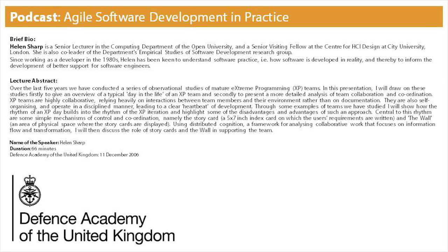Okay, so the developers estimate the stories and say how long they think it's going to take, and at this stage the stories tend to be small units of development. If an iteration is a week, your intention is a story is going to be done in a week. Now, having said that, we have seen stories that have lasted 2 or 3 iterations. A, because they got the estimate wrong. B, because the analysis wasn't done properly, and it hasn't been caught early on. So it doesn't necessarily happen in an ideal way. But at this stage, they should be that sort of size.